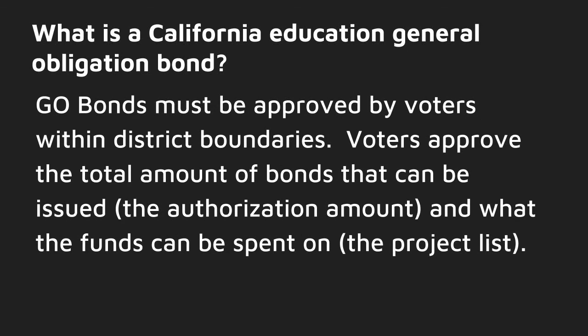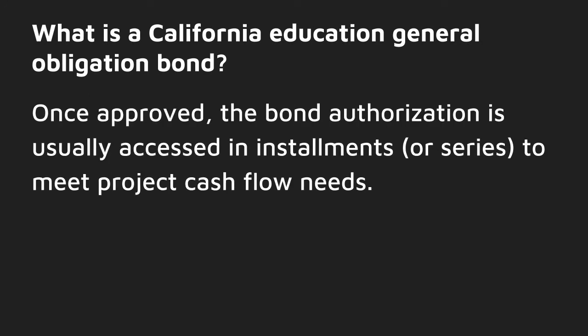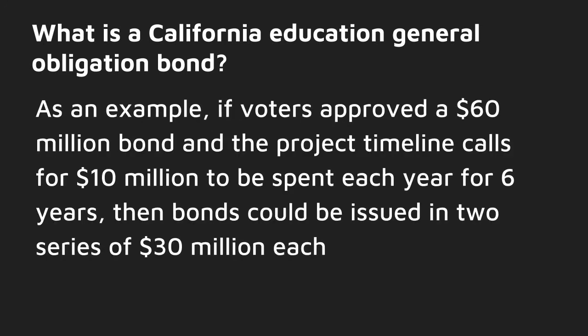GEO bonds must be approved by voters within district boundaries. Voters approve the total amount of bonds that can be issued, or the authorization amount, and what the funds can be spent on. Once approved, the bond authorization is usually accessed in installments or series to meet project cash flow needs.